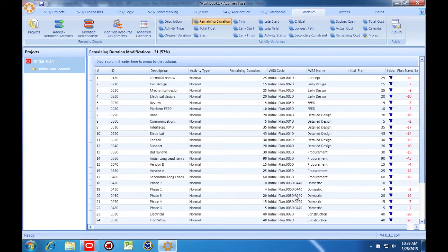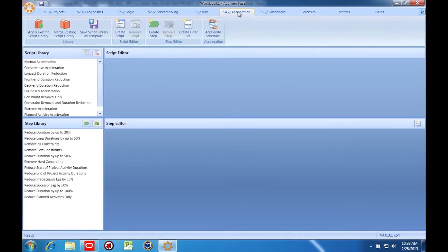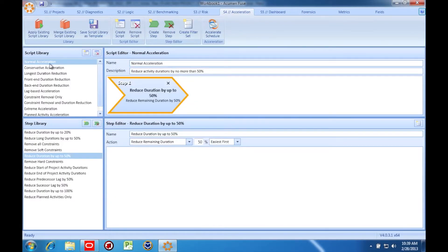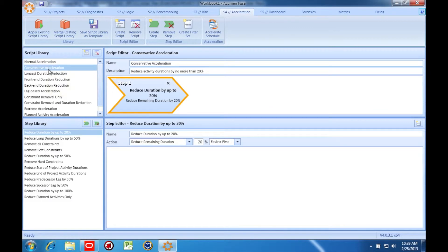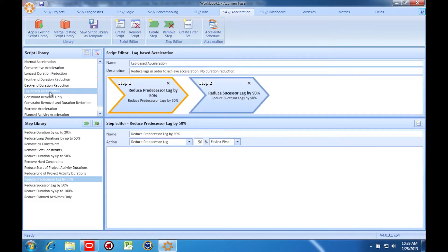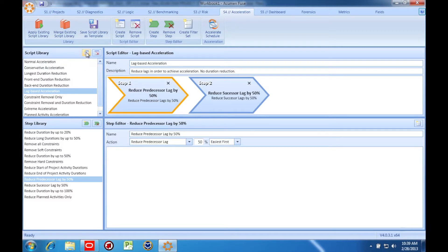One more thing. I mentioned earlier that the acceleration scripts have detail behind them. In fact, they're completely customizable. The script library contains the details of each acceleration strategy and the individual steps they're comprised of. Not only can you inspect the scripts and steps here, you can create your own through the easy-to-use interface.